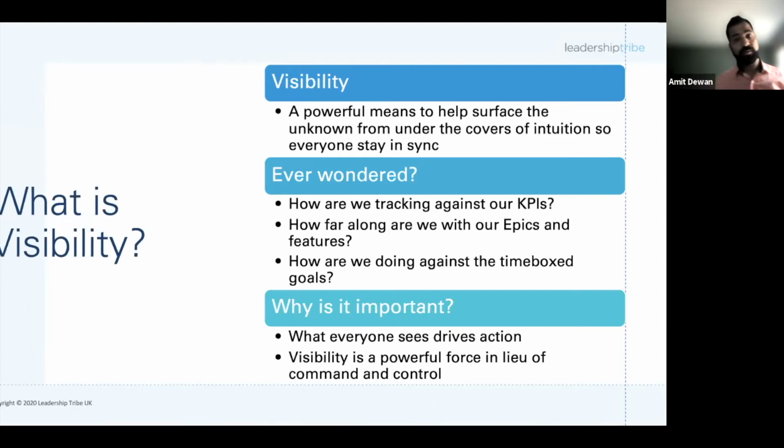What I've found useful in my previous experience is dashboards help a lot, and I've built dashboards at different levels. At an enterprise level or portfolio level, you'd have dashboards which will speak to larger goals. What's the entire initiative, how far along are we, are those initiatives aligned with the roadmaps, the outcomes that the organization cares about. So there are tools to support that, and in real time you'll be able to see, oh, we're 20% done, okay, next week we're 22% done. So you'll have those dashboards instead of weekly emails or status updates or decks.